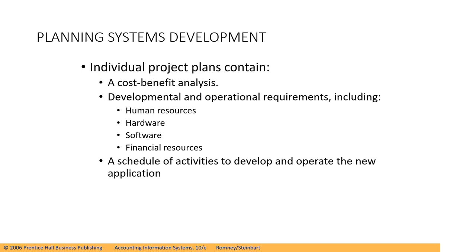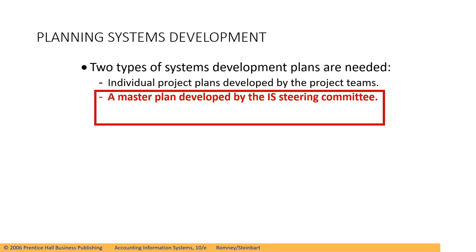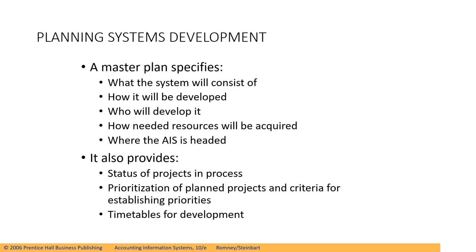The individual project plan contains a cost-benefit analysis, developmental and operational requirements including human resources, hardware, software, and financial resources, and also a schedule of activities to develop and operate the new application. The second type is a master plan, developed by the Information Systems Steering Committee. A master plan specifies what the system will consist of, how it will be developed, who will develop it, how needed resources will be acquired, and where the AIS is headed. It also provides the status of projects in process, prioritization of planned projects and criteria for establishing priorities, and timetables for development.